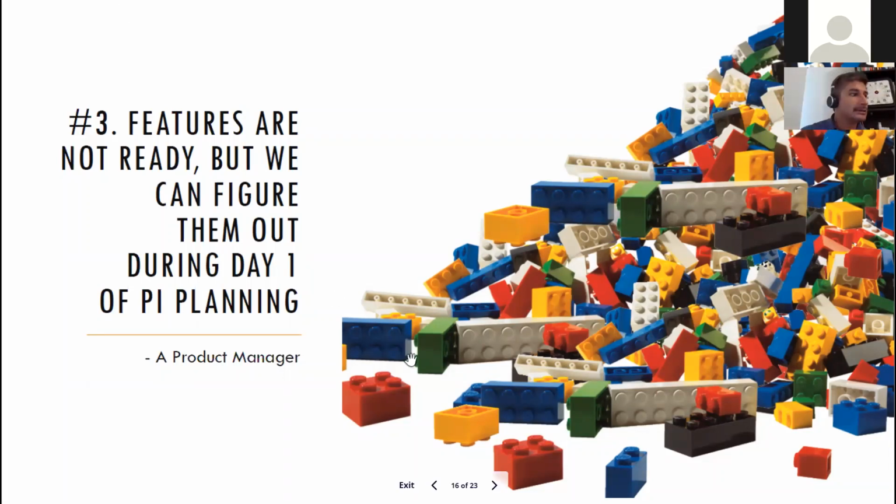So notice, this is the last of the first 3 elements before preparation. You will have a lot of doubts and a lot of questions about why you need to spend 2 days on this. This is key because you need to have this time to adjust between these 2 days. You need to have training, especially for your facilitators and your POs, and you will need to come up with the top 10 features, groomed or refined in a way that you can start your sprint later. So remember to have at least 2 sprints ahead in order to identify the user stories that you will have. This is also a way of having a healthy product backlog, whether you are using SAFe or not. Cool. So these are the first 3 elements before starting the preparation.